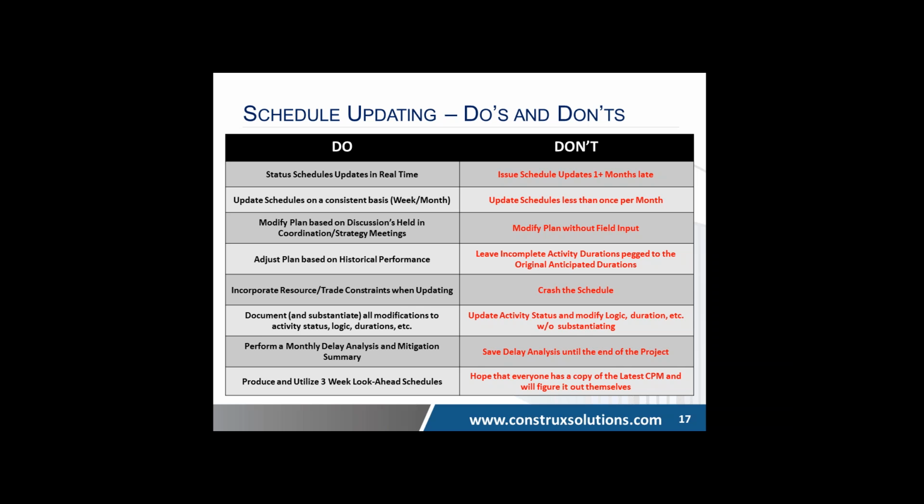So any contractor out there, if you get to a point where the owner is not accepting your schedule, and I've been down the road of disputes, keep using your schedule. Let the owner do their little thing, but keep using your schedule. If they want to make some tweaks, yeah, you can discuss that, but up until that point where it's decided, manage the way that you need to manage and track that progress and document that schedule that you were using at the time.